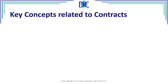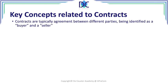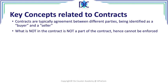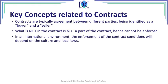When we look at key concepts specifically related to contracts, a contract must include the different parties, typically identified as a buyer and a seller. It's very important to understand that what is not in the contract is not part of the contract and cannot be enforced. So when something is not written in the contract, it means it's not there and doesn't have to be done — it should have been written in the contract.